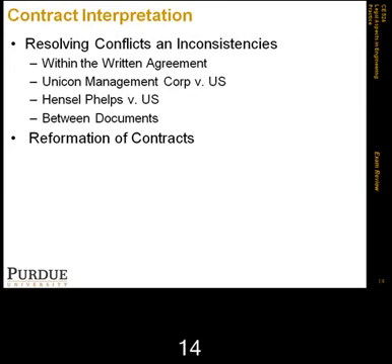So there was this case of National Presto versus the United States. This particular case was for the construction. It was basically creating. This was what we call a joint enterprise experimental situation, where the government was really interested in the process of creating the product rather than the product itself. So therefore, the Court of Claims looked at this case, and they decided that